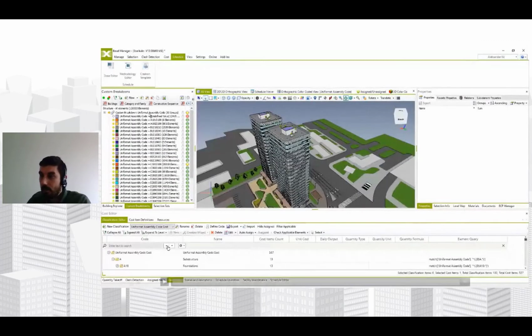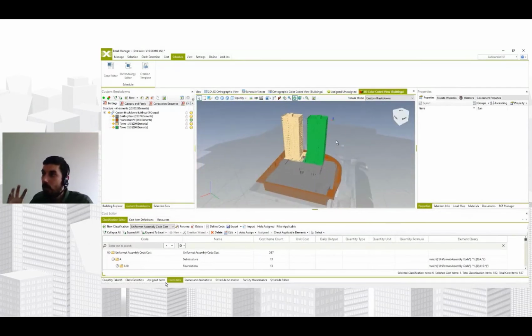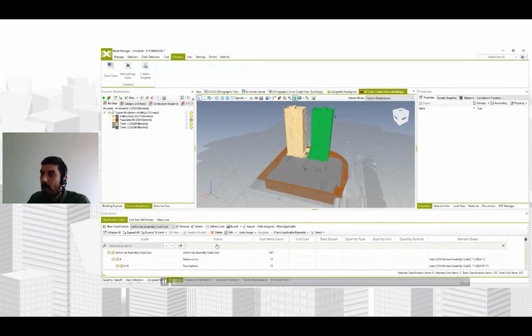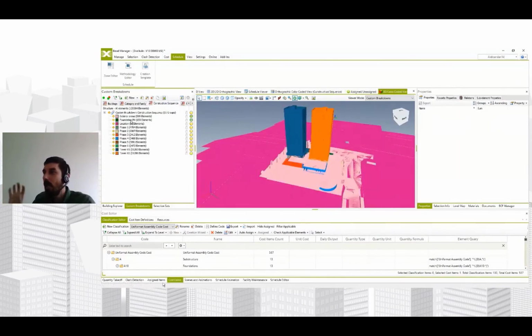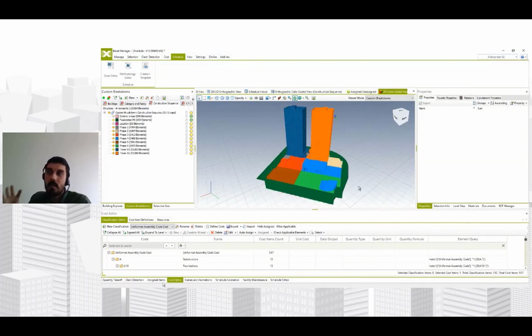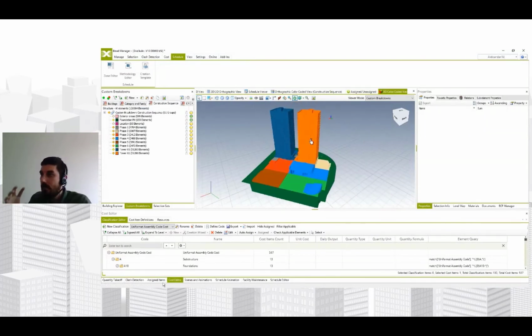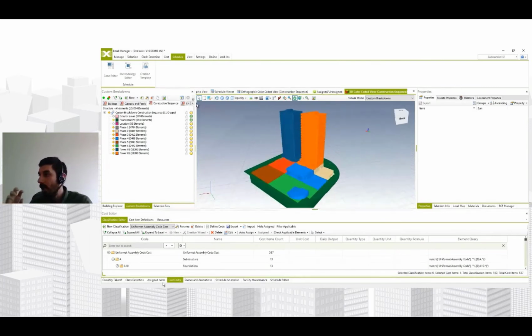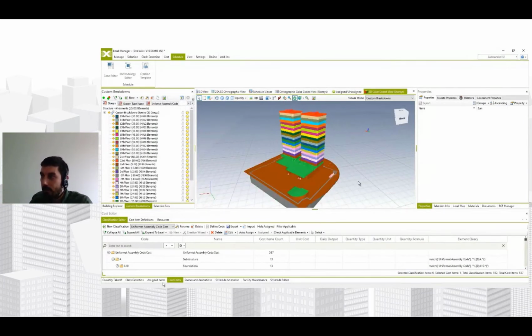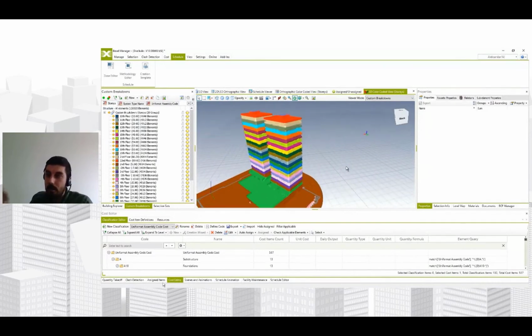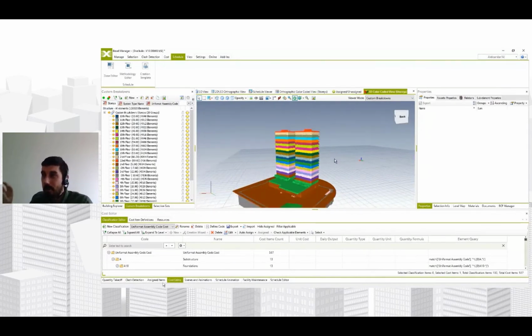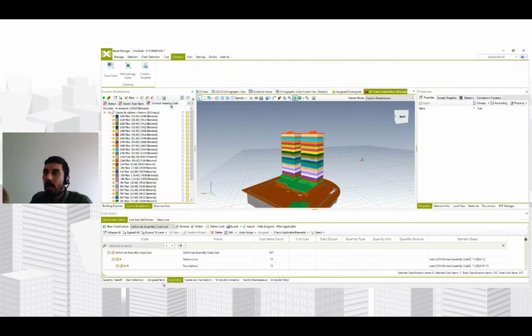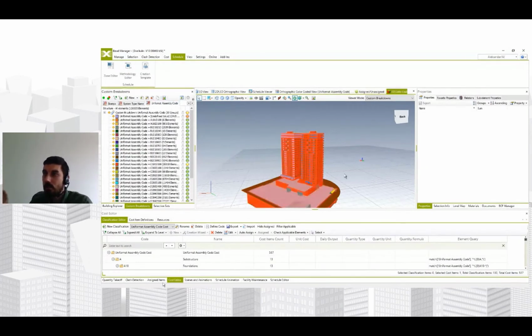So this is a practical example of how the whole process looks. If we talk about spatial organization of the project, again, we are relying on information that is available in the model. Every model has defined buildings, it has defined phases, and even if they are not defined, it's easy to define it within the user interface. Every model has defined stories, so we can just rely upon that information, and based on this, go and create the zones for this project.